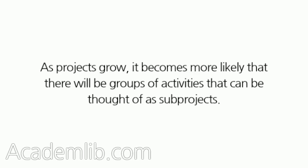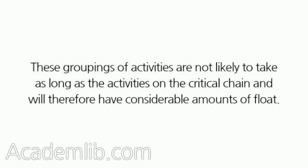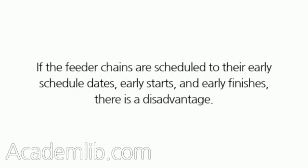As projects grow, it becomes more likely that there will be groups of activities that can be thought of as sub-projects. These groupings of activities are not likely to take as long as the activities on the critical chain and will therefore have considerable amounts of float. If the feeder chains are scheduled to their early schedule dates — early starts and early finishes — there is a disadvantage.